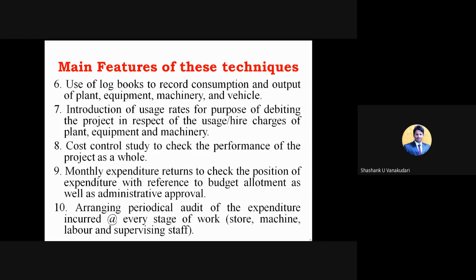And introduction of usage rate for the purpose of debiting the project in respect of usage or hire charges of plant, equipment, and machinery. So by using these techniques, we'll come to know whether we need to hire a particular equipment or whether we need to purchase it. That depends upon the total duration of that equipment's usage. How many days we are going to use that equipment, depends upon that the total calculation can be done. The different estimations will be there, and depending upon those estimations, we'll come to know whether we need to hire an equipment or purchase it.